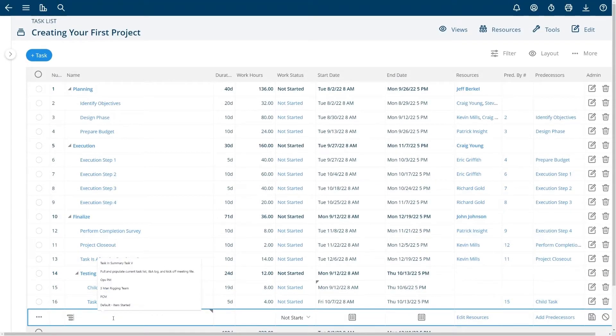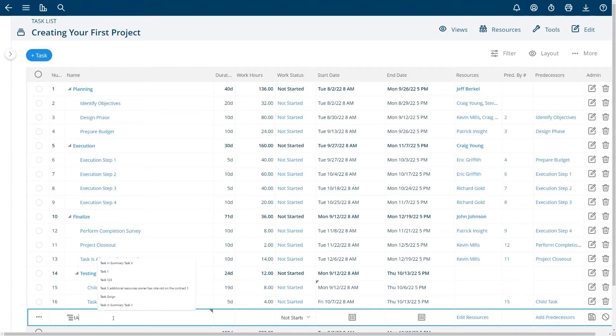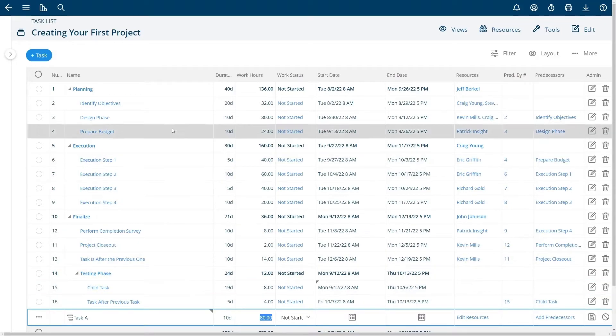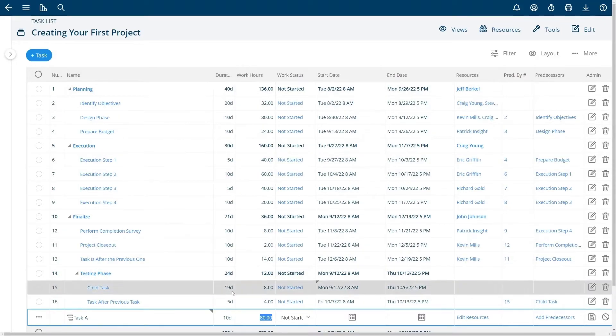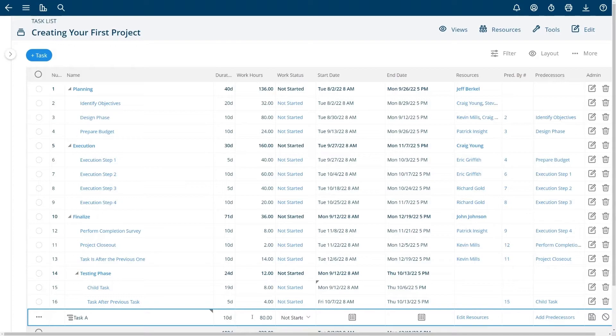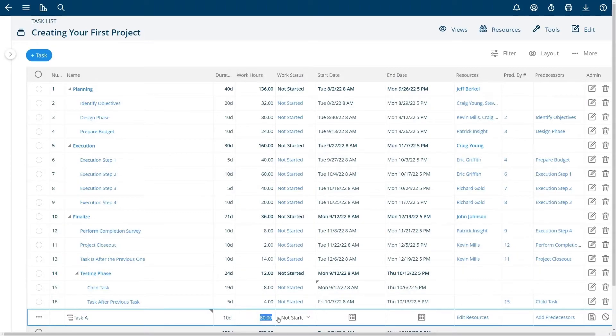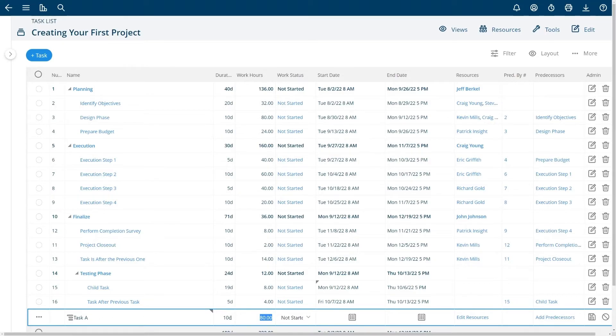I'm going to talk a little bit about duration and work. Task A here has a duration of 10 days and a default of 80 hours. The duration is how many business days you're giving someone to actually get the task done. That is what drives the dates of the task but it's really important here to use the work hours and this is how much hours or effort it takes to actually get a task done.